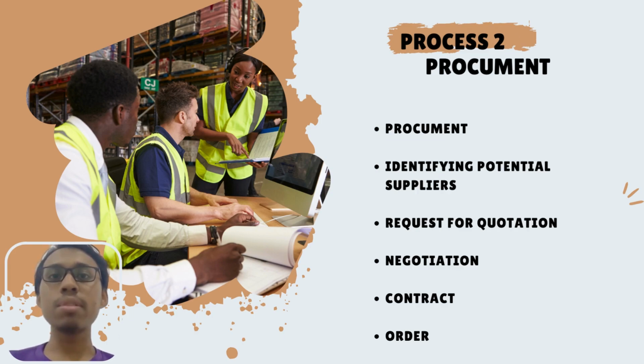Negotiation is based on the terms and conditions of the procurement items. Later, we draft the contract after the negotiation. Afterwards, the order will be sent to the sellers based on the previous agreement. Those are the image examples of components required to establish the oil rig, the metals, the pipelines. However, we must also ensure multiple aspects in procurement like ethical standards, risk assessment, and also cost estimation.